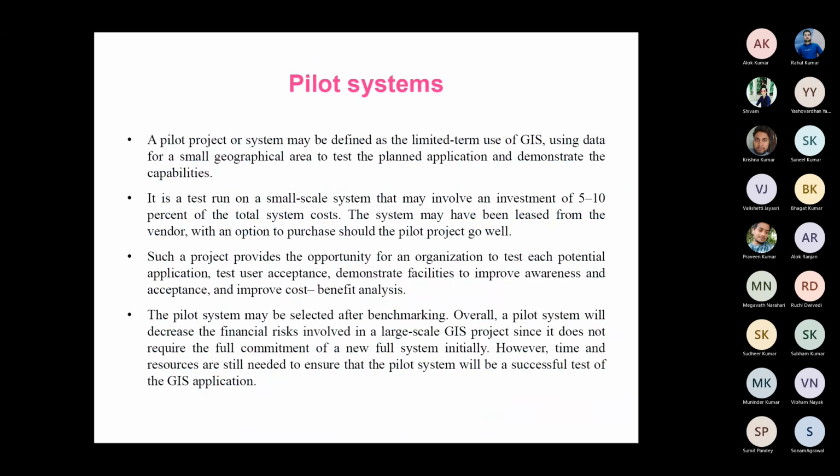Now, another thing is the pilot system. Okay, what is a pilot system? Many times, instead of applying the system on the whole region, we create a small region, and on the basis of that, a pilot project is created. Okay, so a pilot project or system may be defined as the limited term use of GIS using data for a small geographical area to test the planned application and demonstrate the capabilities. It is a test run on a small scale system that may involve an investment of 5 to 10% of the total cost. The system may have been leased from the vendor with an option to purchase should the pilot project go well.